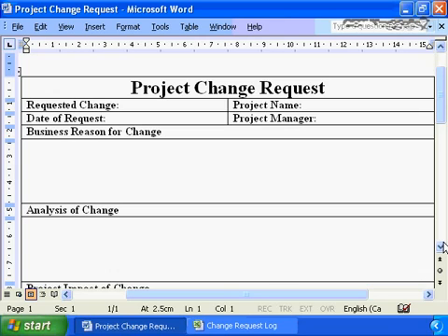If you're producing a final product, go back to our bread box example, and once the bread box has been through a prototype phase, the business decides that 2 hinges on the bottom of the bread box isn't enough, that they need 3 hinges, that is an approved project change. Any change to any approved, and that's the key, any change to any approved component must be documented through the change management process.